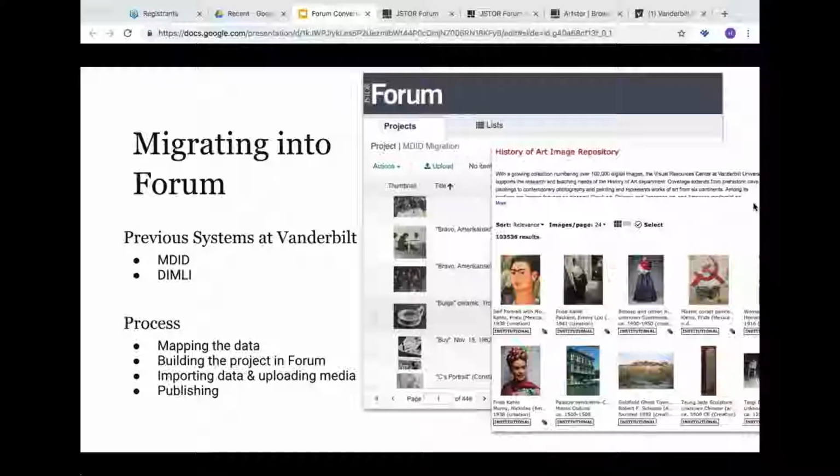So I will do things like seeing how many data records have come through, how many images have been uploaded, and also the relationship of how many images have properly synced up to data records and how many might be free floating, so that we know those numbers and I can present them to the institution to say, hey, let's talk about these. Do you know why this might be? How can we solve it before we close it?